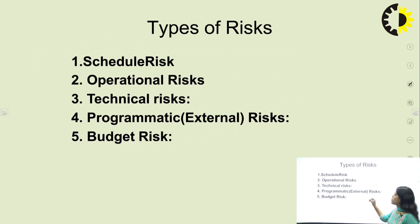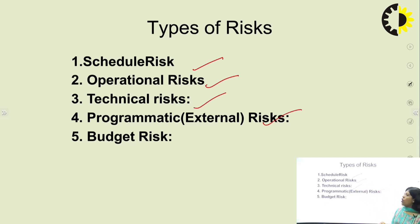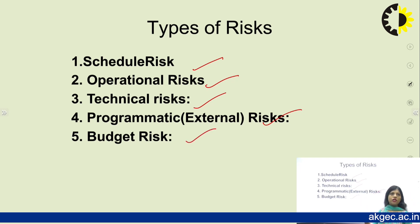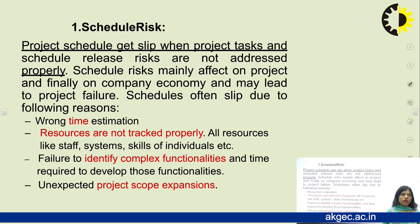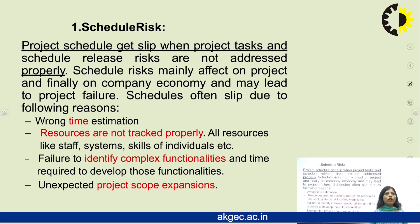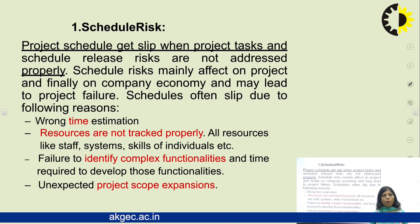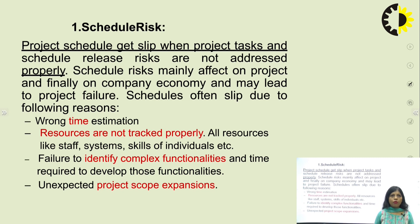The types of risk are: scheduled risk, operational risk, technical risk, external or programmatic risk, and budget risk. Scheduled risk occurs when project tasks and schedule release risks are not addressed properly. It mainly affects the project and finally the company's economy, possibly leading to project failure because the project is not completed on time. Reasons for scheduled risk include wrong time estimation and resource issues.